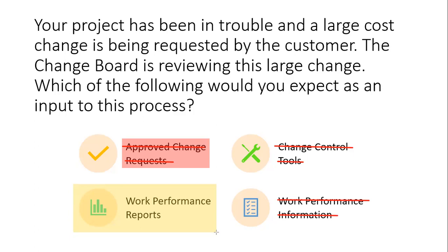Now, it's not explained to the degree that I will explain it. However, using these items mentioned, resource availability, understanding resource availability could help you decide whether to approve or reject a change request. If you don't have the resources to carry out the change request, don't do it.